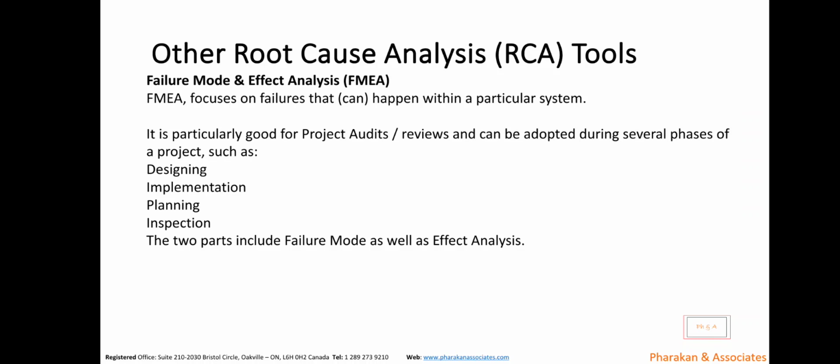And so typically in any project life cycle, you have the design phase, the implementation, the planning, and the inspection, or the QA, testing, whatever it is that you call it. Now at the design, usually a very major failure point, because that is where you need to, first of all, do your business requirement definition, BRDs. You also need to do your requirement gathering. Oftentimes, projects fail at that point because sufficient resources and time, our attention is usually not committed to this at the design phase. So it's either the process owners are not taking responsibility by really paying attention to define,